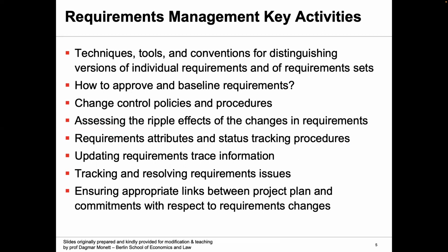How to approve and baseline requirements. Baselining means a set of requirements that has been reviewed and agreed upon, and it serves as the basis for your further development, right? It can even involve an agreement that all the parties sign off, where they say that, yes, these are the requirements that we have discussed, and they will be sent for further development. Those requirements will be titled your baseline requirements.